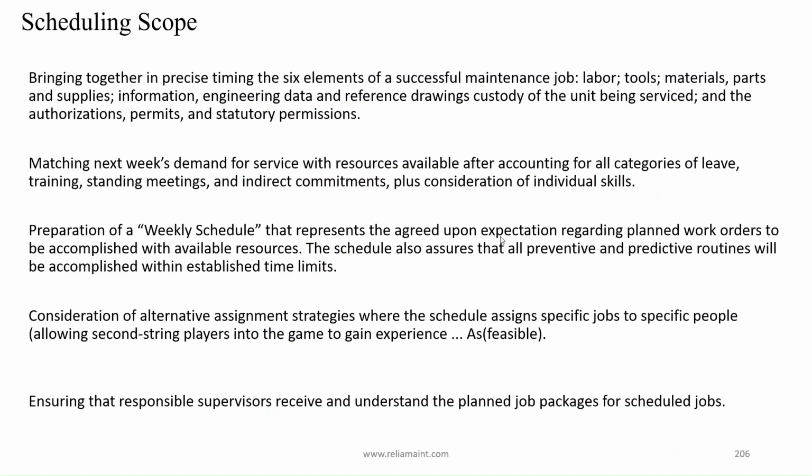The schedule also assures that all preventive and predictive routines will be accomplished within established time limits. Consideration of alternative assignment strategies, where the schedule assigns specific jobs to specific people, allowing second-string players into the game to gain experience, as feasible. Ensuring that responsible supervisors receive and understand the planned job packages for scheduled jobs.